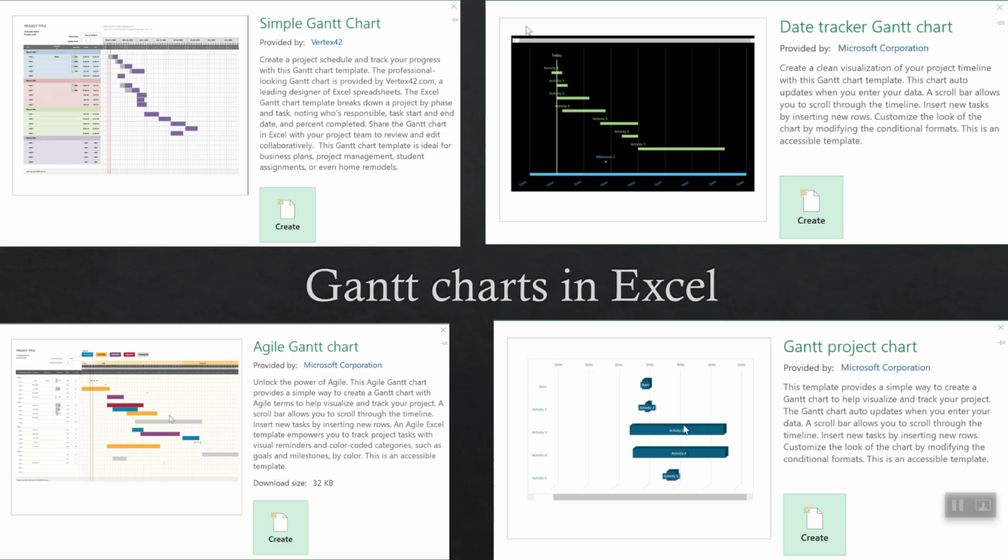Excel has really expanded its Gantt chart templates. They're easy to use, but at the present time, they don't have the feature for linking tasks to show relationships. That is, to show that a prior task must be completed before starting the next task. You could create and insert an L-shaped arrow to show those relationships.